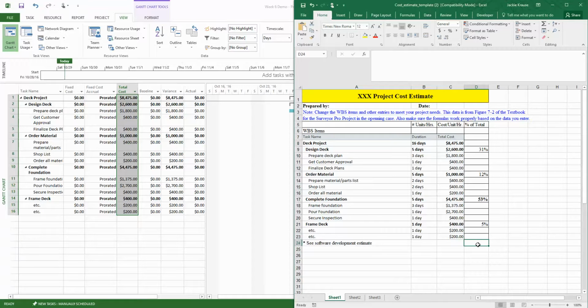Let's find out. So if I hit equals sum and I come right up here and go boom. How did I get that? I'm probably on a percentage. There we go. All right, so now I have a total of 100%. All right, that I do want you to calculate for me. I want you to calculate the totals of each of these major tasks as the percentage of your total overall cost. All right, so there you go.